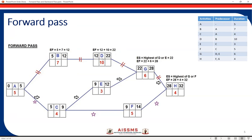Now we'll go to activity D. D is dependent on activity B. Once B finishes, we can calculate the ES and EF for activity D. Activity B finishes at day 12, so this EF acts as ES for activity D. Early start for D is day 12. Early finish: 12 plus duration 10 equals 22. So 22 will be the early finish for activity D.